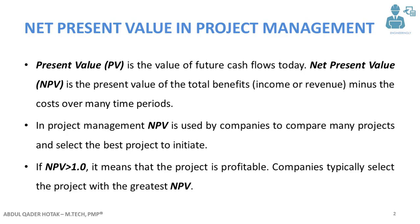That method is also used to compare projects and select the most profitable one among them. Present value is the value of future cash flows today, which means that we are converting the future cash flows to today's rate by the interest rate that we have.